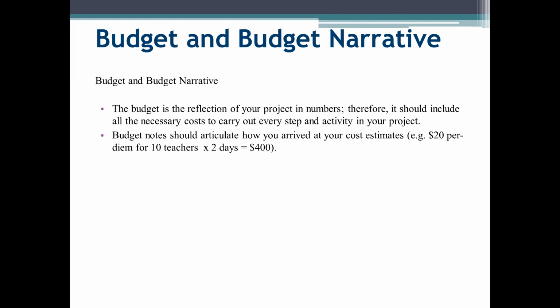When the review panel looks at your budget, they'll ask themselves, can the project be accomplished with this budget? Are costs reasonable for current prices? Does the budget match proposed activities? And is there sufficient budget detail and explanation? The application will include a sample budget and a sample budget narrative for you to use as a guide. So let's look at that next.